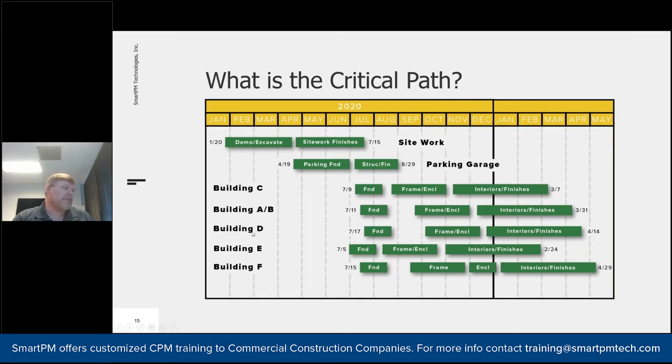You might even assume that since there's more work to be done over here, it's probably the more critical path. But at the end of the day, this was our longest path. This is where the resources need to be. This is our focus area if and when challenges came. If and when it rained, we would work the weekend on that other activity, because it's just that much more important. So that is really, to me, a very powerful piece of this.